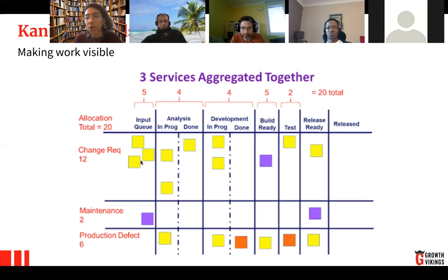It's not that they already have these 20 and then add 5 because someone else asked them to do 5 things, and they just put it in, so a lot of work keeps being pushed into it. No, they try to move fast in the sense that if there's new work they want to let in, first they complete this one and then they let the next one in. So it's not that they're not oriented to respond to the organization, it's just that they don't let the organization push the work in. They pull the work that the organization has given them once they finish that key prioritized work, as you can see.